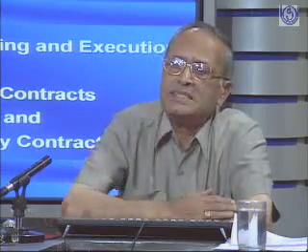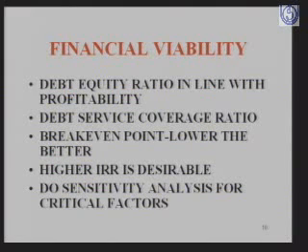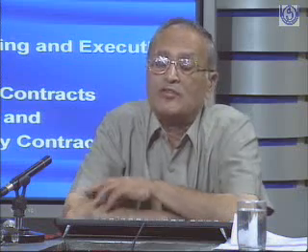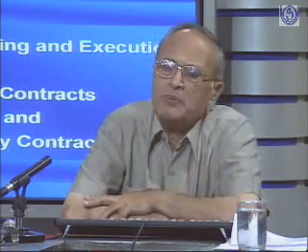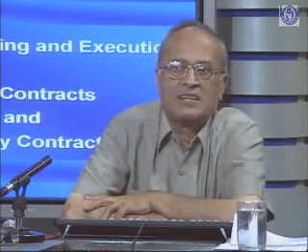And now we come to sensitivity analysis. See, what we mean by sensitivity analysis is that there are certain critical factors. For example, I may not be able to achieve the production envisaged. I may be achieving less production, or my cost of production might go up, the cost of raw material may go up, the power utility cost may go up. So I will try to find out which are the critical factors, and I need to see how my project would behave if these factors are changed.